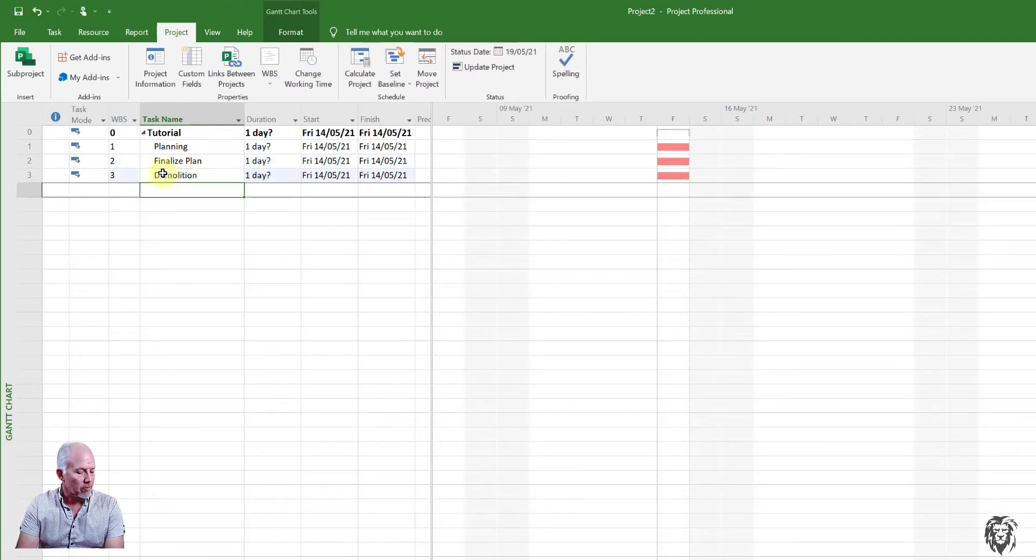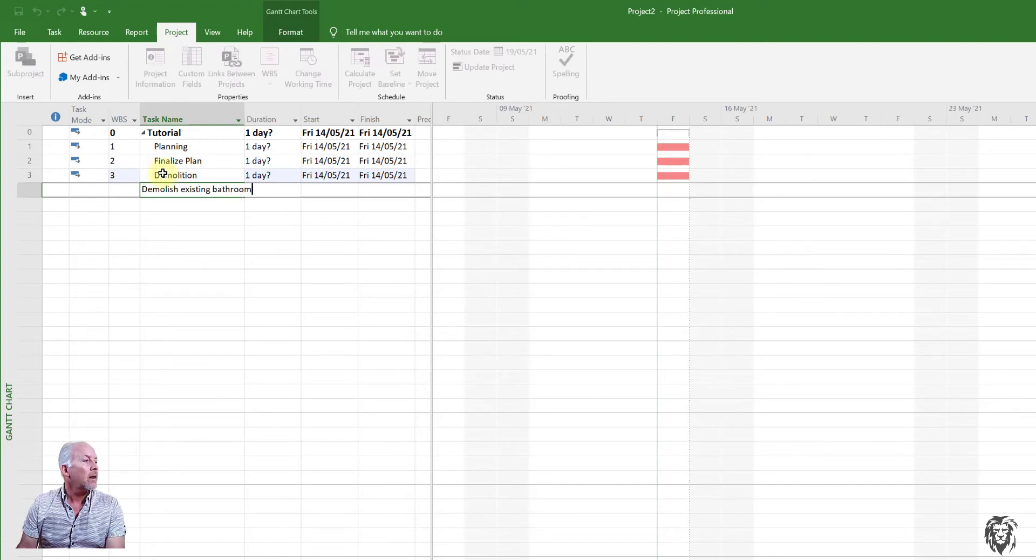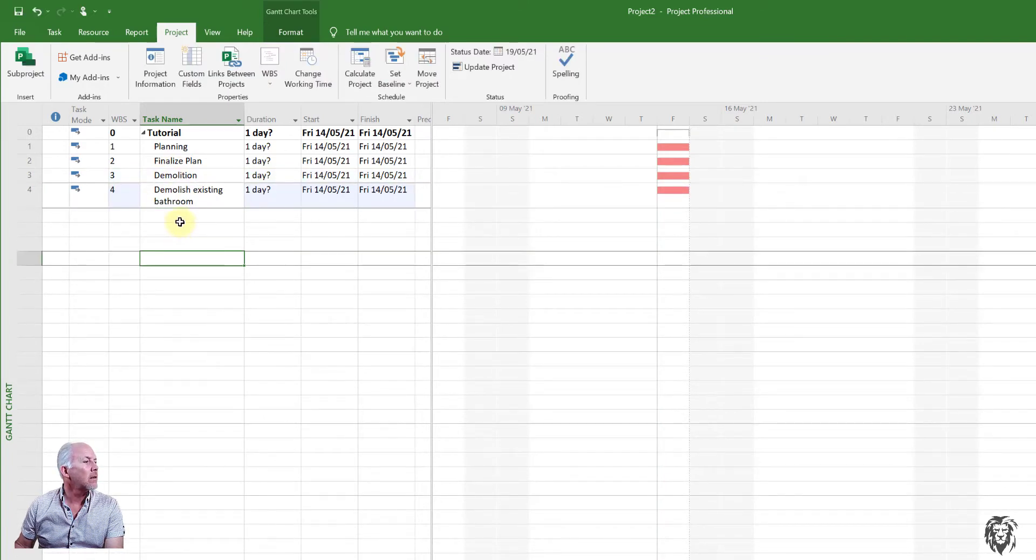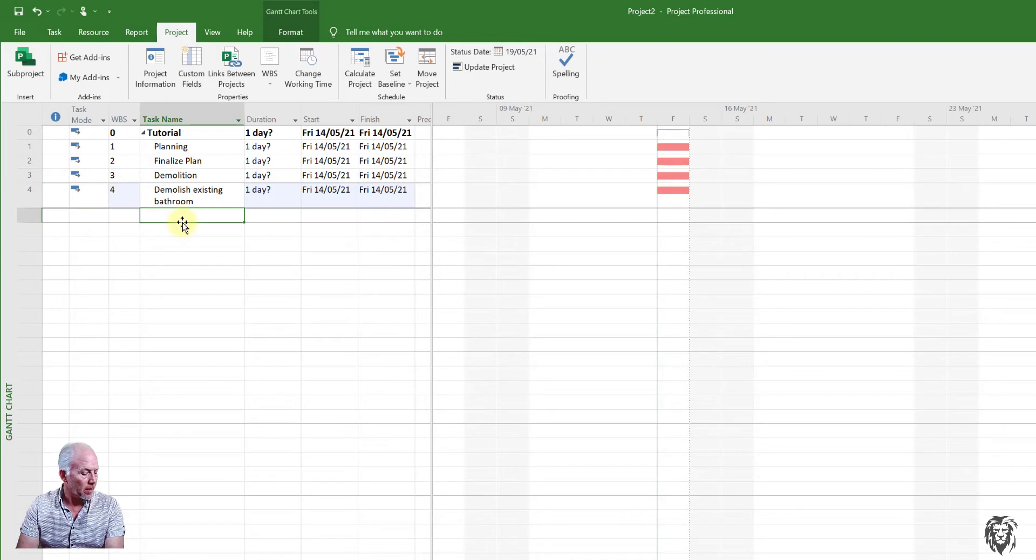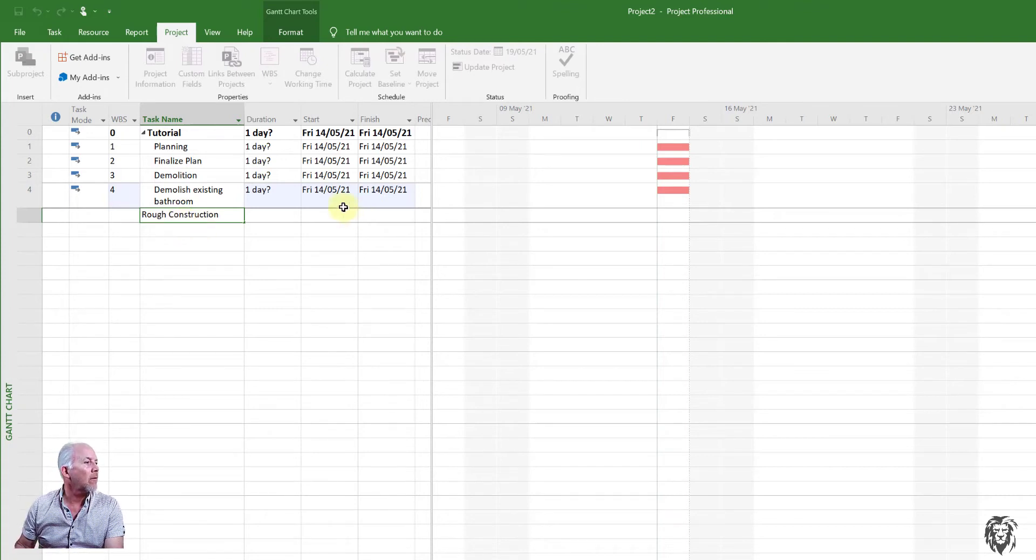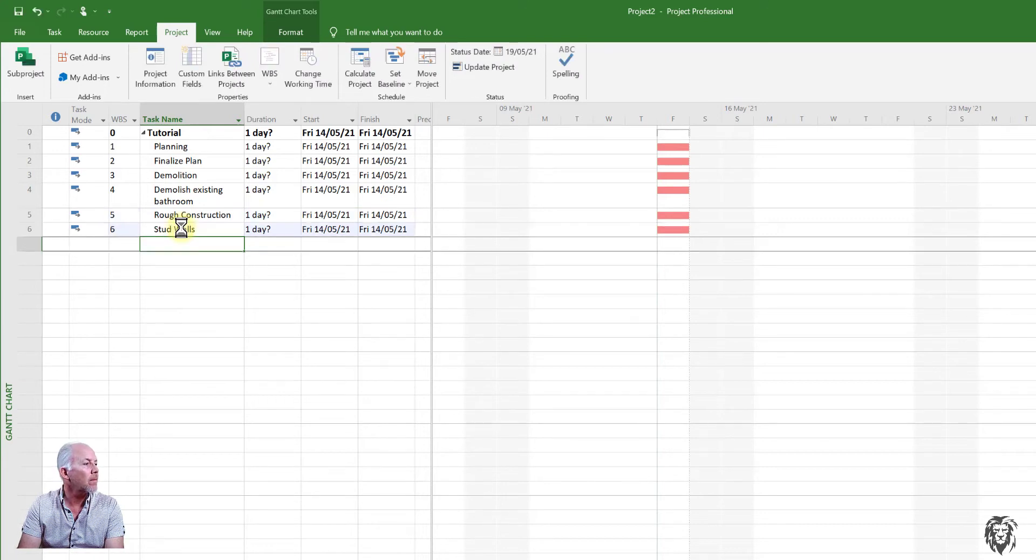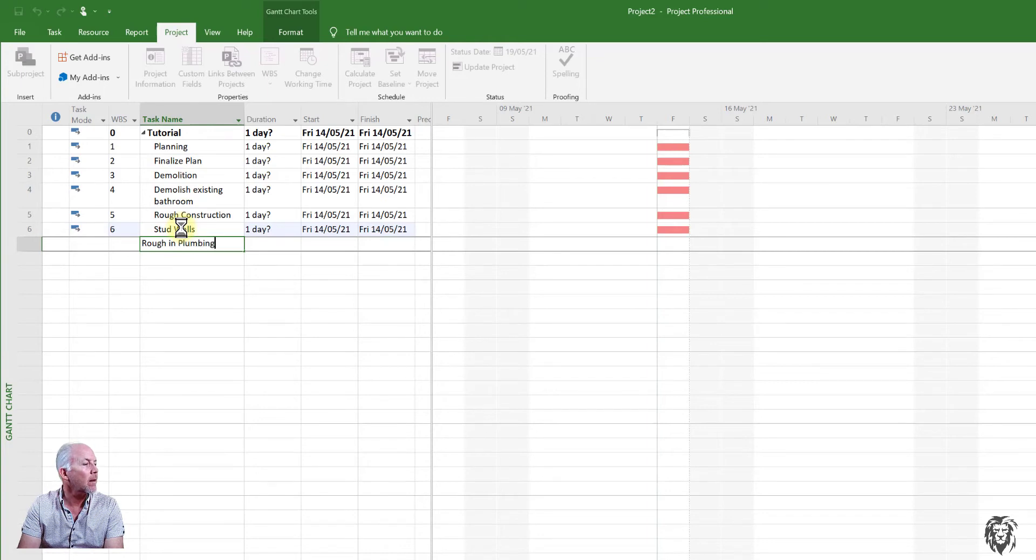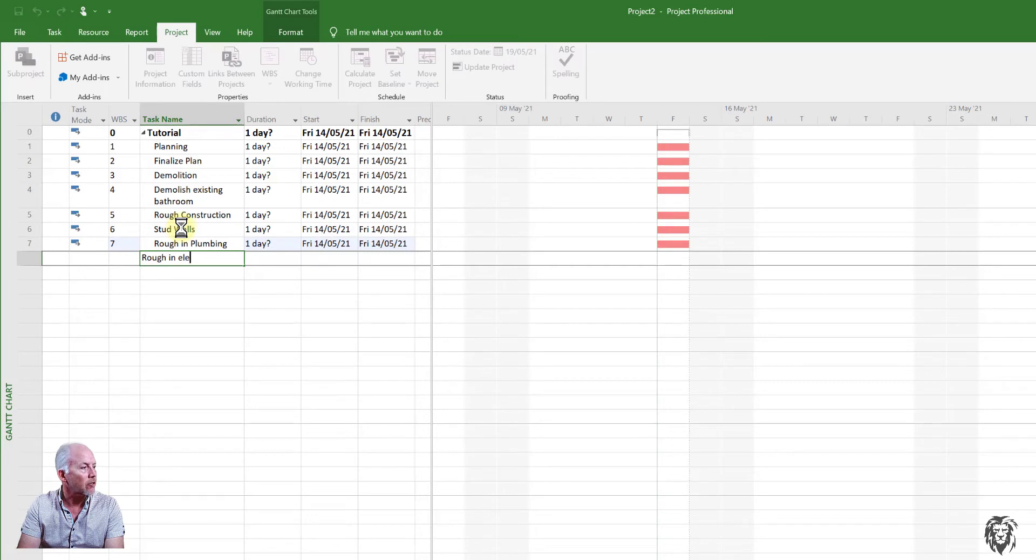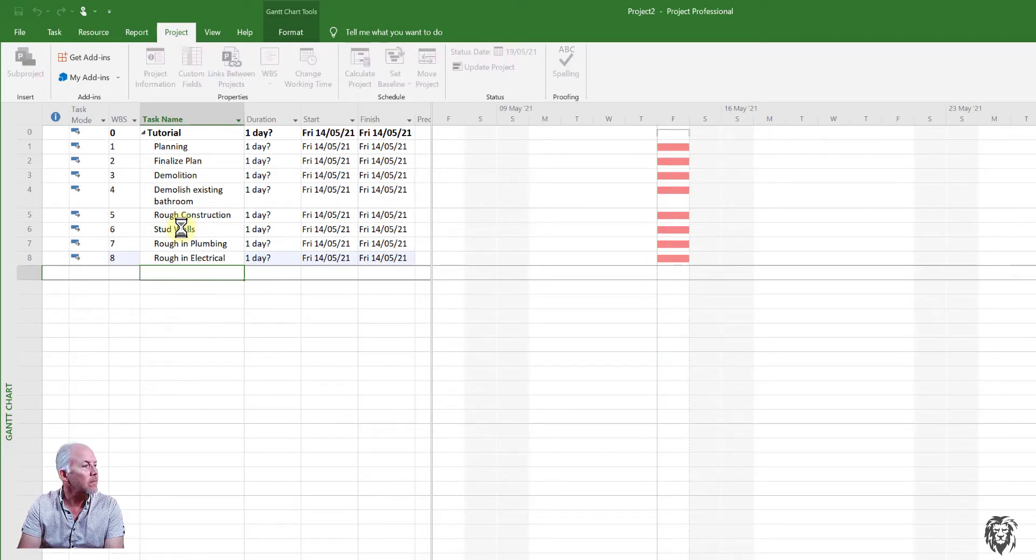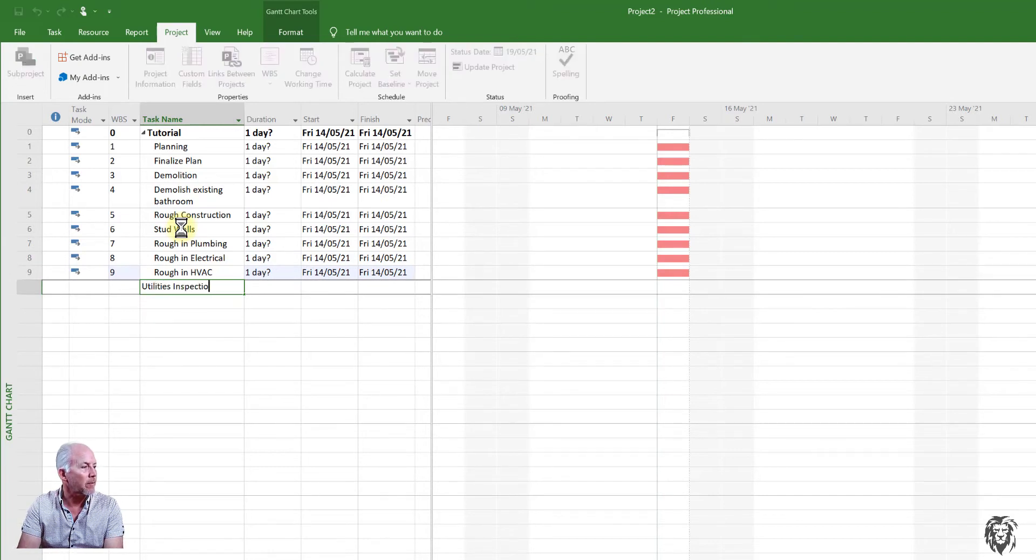And we can just go on before we can get started. We need to demolish what is there and ultimately, and I'm doing this here because I want to actually categorize. And then let's say we start our rough construction and within rough construction, we're going to do stud walls. I'll just hit enter. It goes down, rough in plumbing. And then we're going to rough in our electrical. Rough in our HVAC. And finally have some inspections before we go in and start closing our walls.